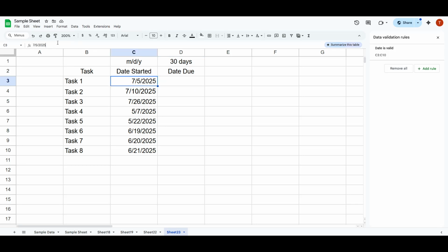In Google Sheets, dates are treated as numbers, where each day is simply an increment of 1. This makes calculating future dates a breeze. First, you want to start off with your existing Google Sheet, where you already have a starting date for a task. This is our reference point, the date from which we want to calculate a future due date. For instance, if you have a project that starts today, that date is what you'll input into your sheet.